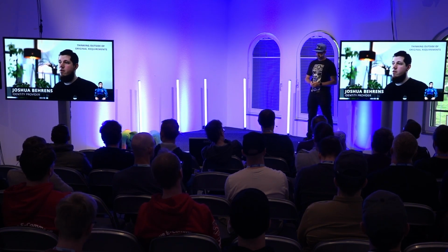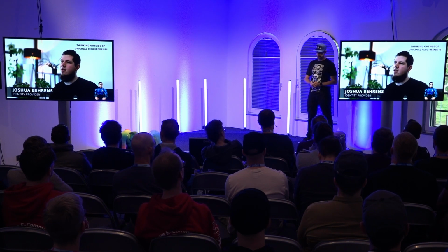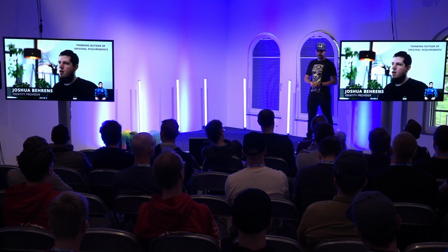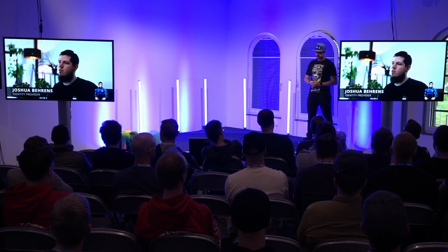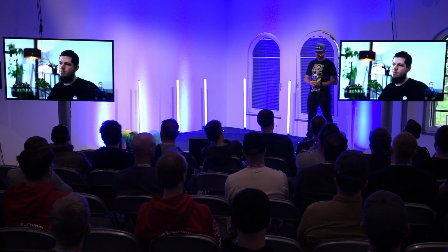Thinking and testing outside of the original requirements are worth it to successfully fulfill a task. Secondly, don't be immediately alarmed and stay calm. There's likely a simple solution. Eventually, although we found a solution, using small open source software requires a technical contact person as much as a big ERP software. Do the migrations repeatedly, right from the beginning of the project, as well as in between. See how the new shop behaves with the most up-to-date data. You constantly encounter new points that demand your attention. However, be cautious when modifying migrated data, as subsequent migrations will revert manual changes. If manual adjustments are necessary, it's better to create a separate copy of migrated data.